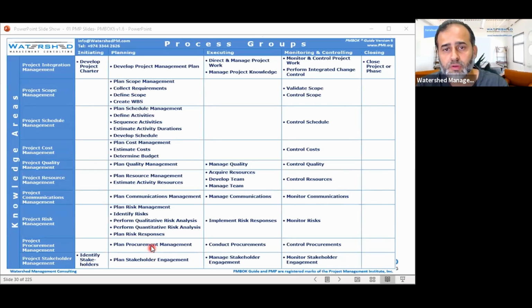Then you submit your budget, whatever you have as output from here, and from develop schedule. Remember, you do everything together. You do quality plan, because of which your resource is changing, because of which your scope is changing, your schedule changes, your budget changes. Then you adjust the resource, then readjust the schedule and the budget because the resource is now limited.